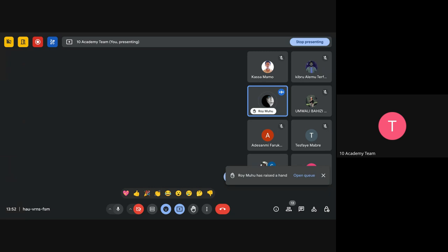So for example, let's create one scenario in which you are developing a task management tool. Let's also assume that we have only two sprints for this project. Sprint one will take 2 weeks. In sprint one, the focus will be on creating basic features, such as task creation, user authentication, and categorization. It's just a naming which specifies, in a project, the timeline and the tasks that are done during that timeline. This is called a sprint together, the timeline and then the tasks that are going to be done during that timeline.